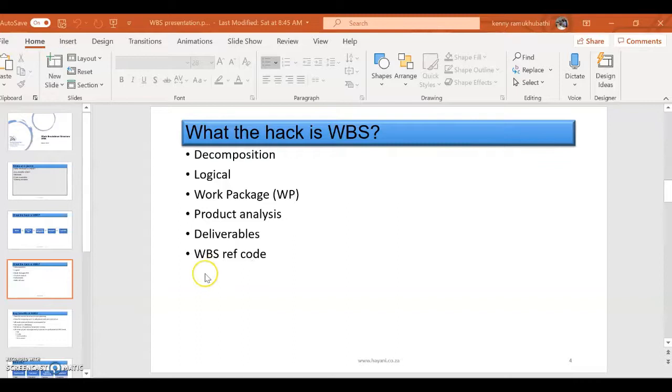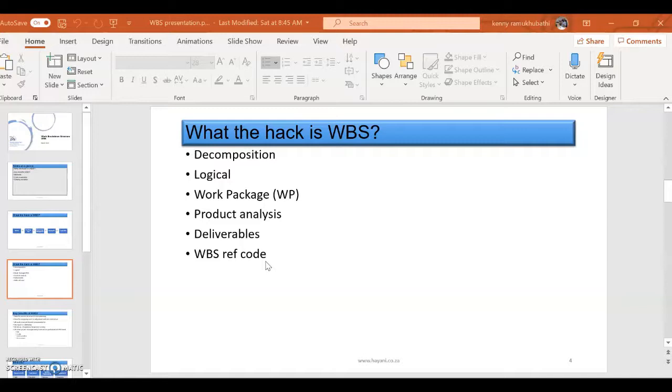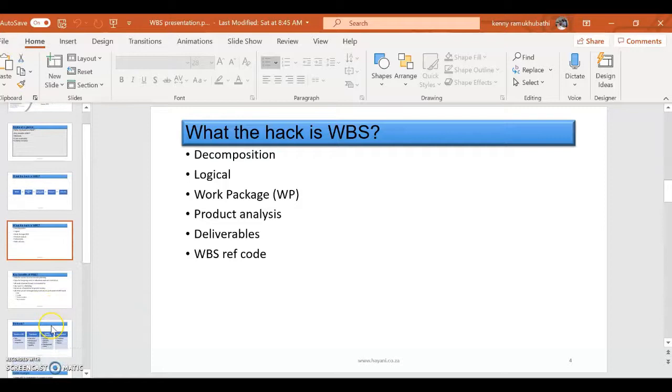The scope of work is to probably manufacture or design and manufacture a power plant, or a small scale power plant. You will need deliverables which are unique terms that you need to deliver. From there you can actually decompose up until work packages. So deliverables are very important - they are measurable in nature and you can deliver it to a stakeholder, but they go with the design of the product or service itself. And then the WBS reference code also talks to - you will see on the few slides that I'm going to do - that every work element, after breaking down the work breakdown structure, all the work elements as you're breaking down into finite parts will have a certain work breakdown reference code. That reference code will be speaking to the level of detail as well.